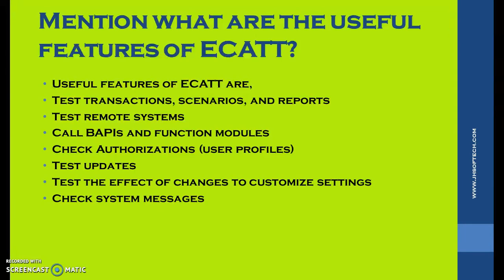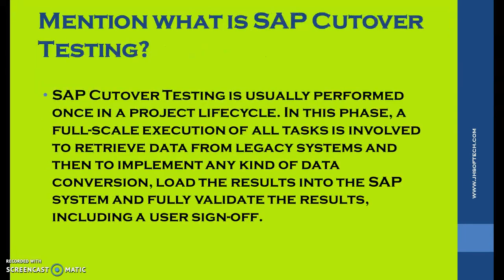SAP cutover testing is usually performed once in a project's life cycle. In this phase, a full-scale execution of all tasks is involved to retrieve data from legacy systems, implement data conversions, load the results into the SAP system, and fully validate the results including a user sign-off.